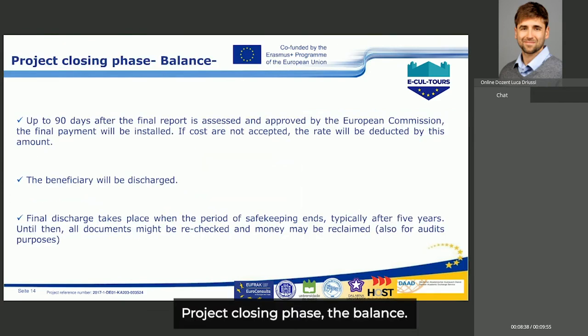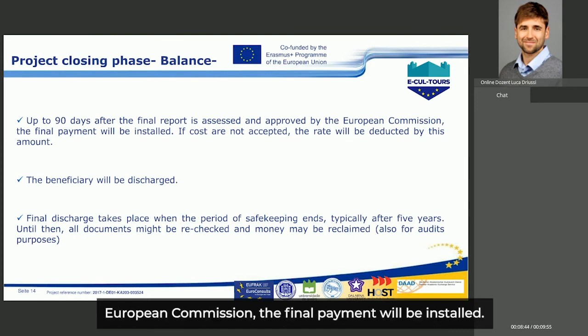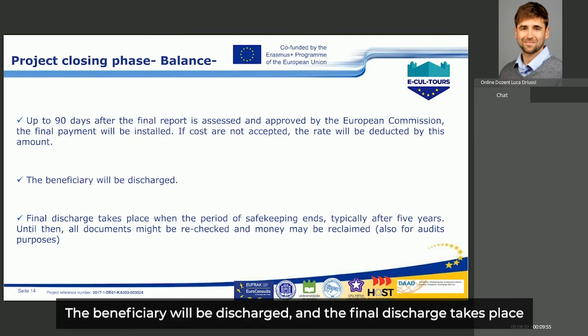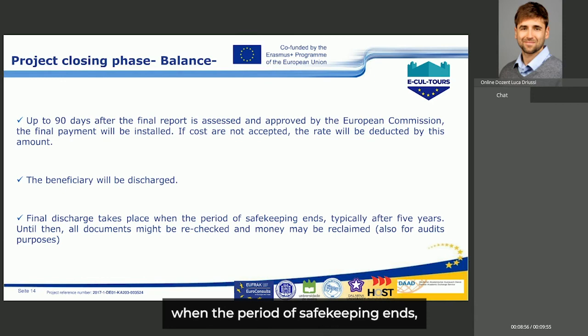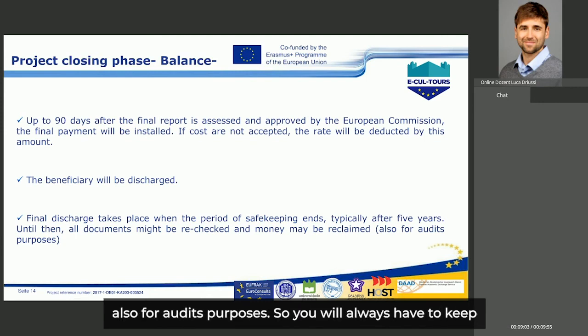Project closing phase, the balance: up to 90 days after the final report is assessed and approved by the European Commission, the final payment will be made. If costs are not accepted, the rate will be reduced by this amount. The beneficiary will be discharged, and the final discharge takes place when the period of safekeeping ends, typically after 5 years. So until then, all documents must be rechecked and money may be reclaimed, also for audit purposes.